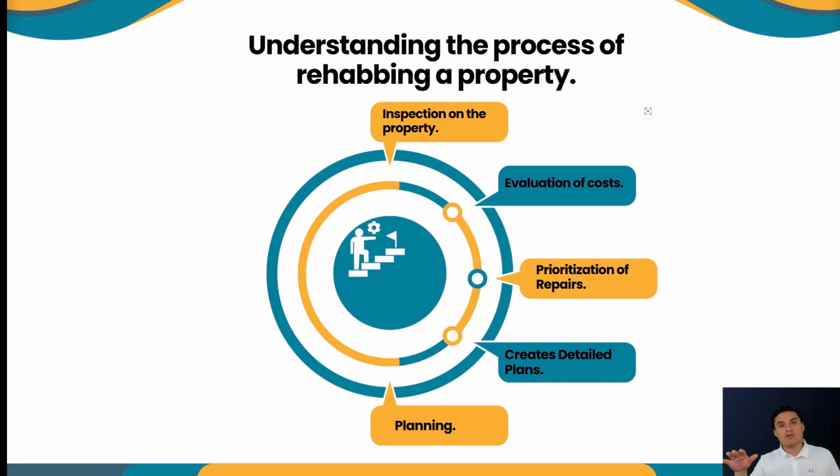Okay, so you still want to do the quick math, $50 per square foot, $40 per square foot, however you want to do it, depending on your area. But you definitely want to make sure that you start memorizing and remembering how much each item is going to cost you, because it's not going to change very much. So for example, for me to get a new AC, a 3-ton unit is probably going to cost me anywhere between $7,000 and $9,000, depending on the house.